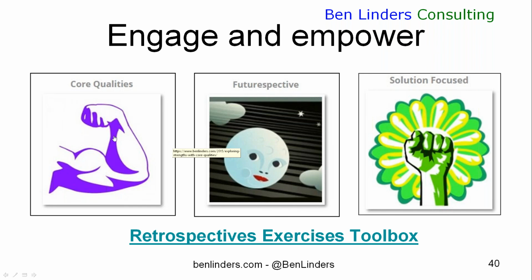Another exercise that I've seen very valuable also is what's called a futurespective. Imagining that your team is in the future, that they actually have been successful in delivering stuff to the customer, and then looking back at how they managed to do this. What were the things that they were doing as a team to get there? And what are the things that they need to get out of the way? So futurespective, getting rid of any barriers that you have right now and really thinking about how to do the best job, can help you.